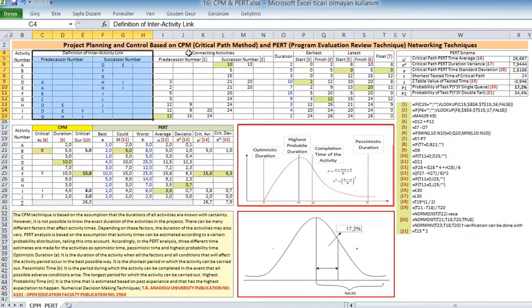the project. It actually helps in the determination of the earliest time by which the whole project can be completed. There are two main concepts in this method, namely critical task and critical path. Critical task is the task or activity which can't be delayed, otherwise the completion of the whole project will be delayed. It must be completed on time before starting the other dependent tasks.